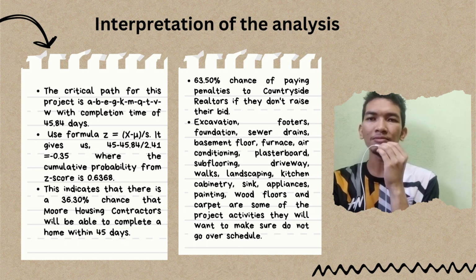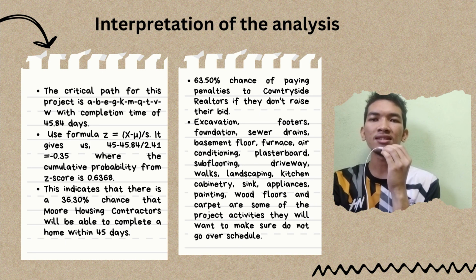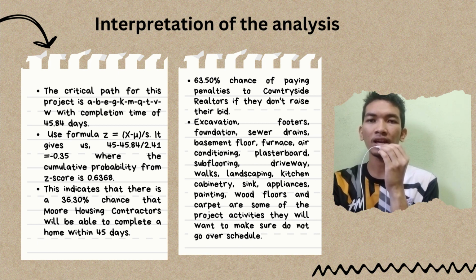One method for determining the critical path is to compute the slack time, which is the time between an activity's latest start and earliest start time, or latest finish and earliest finish time. Every task on the critical path will have exactly 0 slack time.